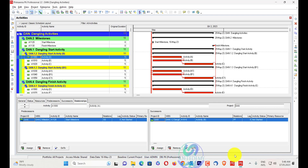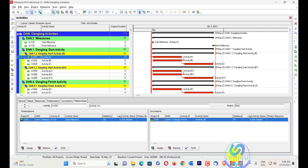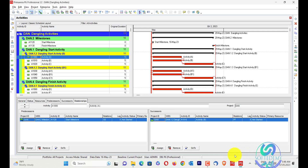First we will understand what are dangling activities. Dangling activities are a type of open-ended activities that have a predecessor and a successor but still dangle from at least one end.